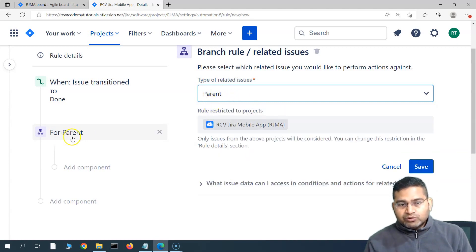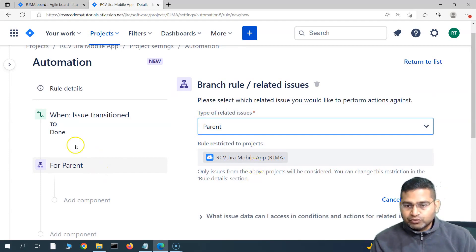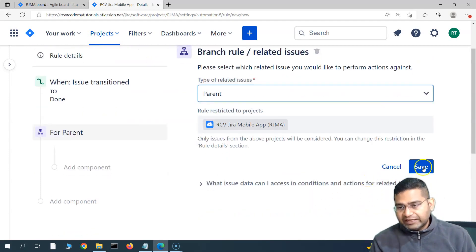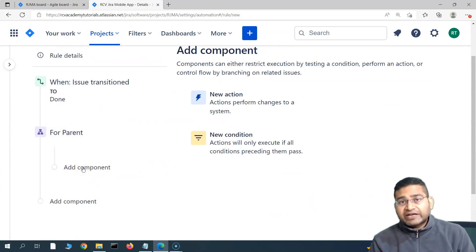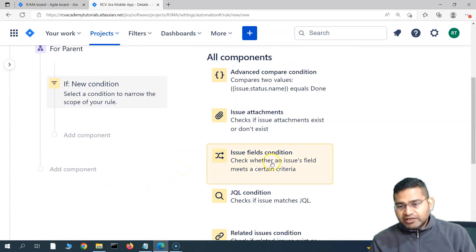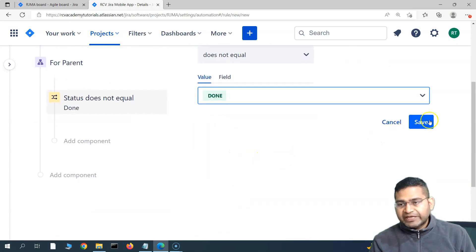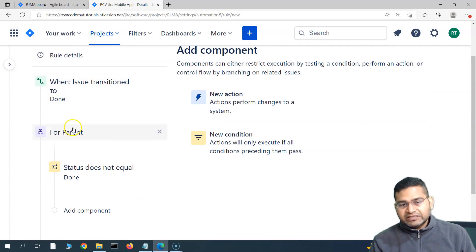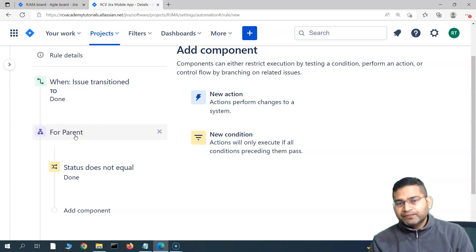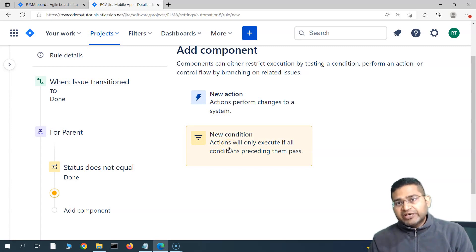This will find the parent issue of the subtask that triggered the rule. We'll save it and then add a condition: the parent is not actually closed. So we'll add a new condition — 'issue field condition' — and set status 'does not equal' to 'Done'. This means when we are transitioning the subtask, it will check the parent of that subtask and verify that the parent has not already been moved to Done before proceeding.